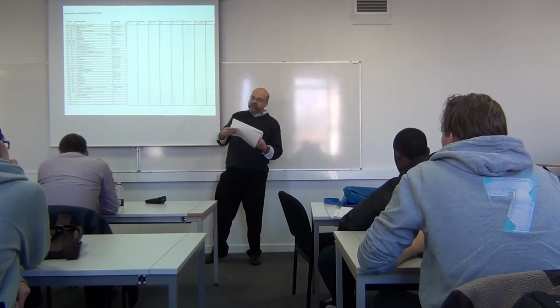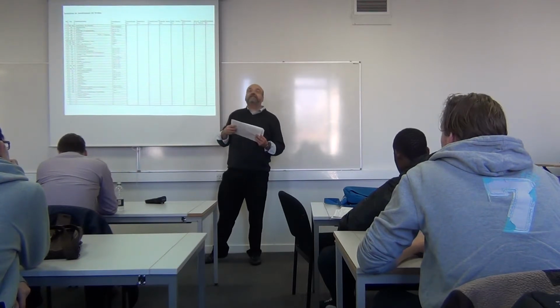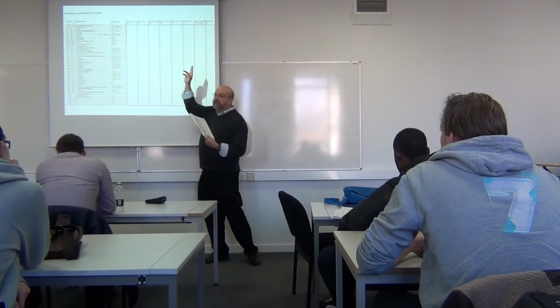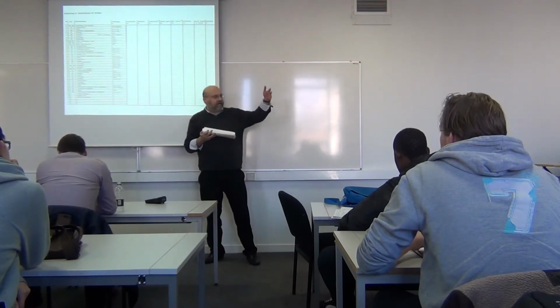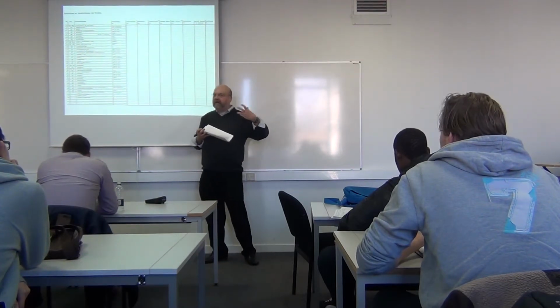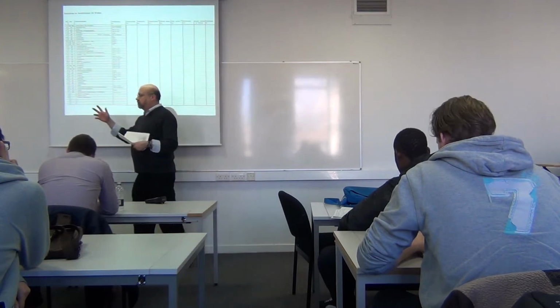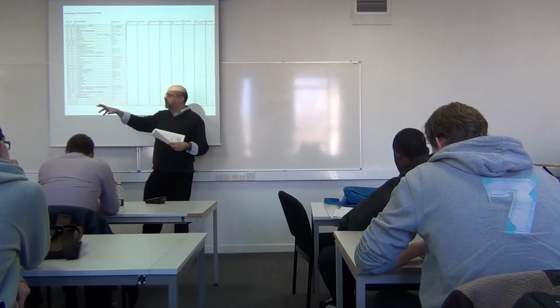Submission of work plan, checking, examining work plans. Provision of samples. Till when have to be the provision of samples? Let's say tiles and everything which is designed, for toilets and kitchens and so on, tiles.